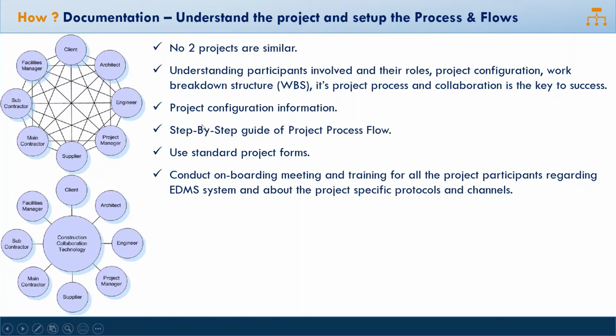Once the configuration and step-by-step process flow is set up and the project forms are made available, before getting any project participant on board, it's always advisable to conduct an onboarding meeting first, and training about the EDMS system for all the project participants. An individual supplier or a vendor, or a company as a main contractor or a design consultant, has to be onboarded with a step-by-step process. The onboarding meeting has to be done.